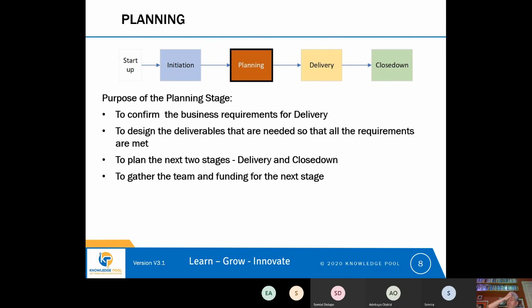And I have seen situations where a problem has come out late in delivery, and the steering group for the project has decided they will go live with the system as it is, with the requirement that can't be met, and then start another project.